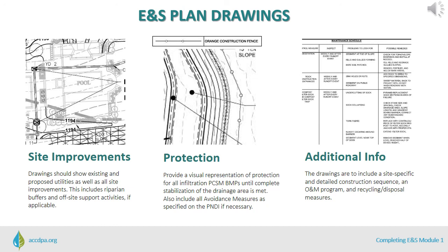We also verify that the ENS drawings contain a site-specific construction sequence, a maintenance program for each ENS BMP, and recycling and disposal measures. Many of these items will be assessed more thoroughly during the technical review, but must be marked as complete or incomplete during this stage of the review.